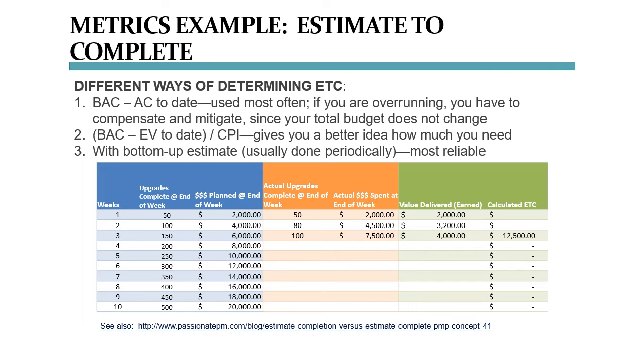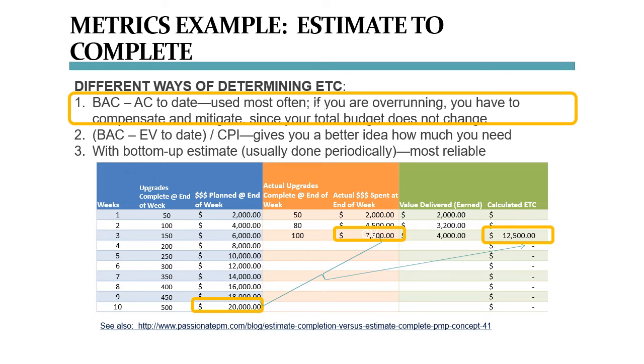If your project is running according to plan, and your earned value does not differ from the plan more than 5% or whatever percentage your organization tells you is okay, and I've worked in some pretty cash-strapped organizations that had a 2% rule, then you can just subtract your actual cost from the initial budget at completion. This works only, though, if you don't expect any costly problems down the road, and if you're confident that you can make up for any delays so that your project comes in as planned in the end. That's what we're doing in the plan you're seeing right here. It's a very rare situation though, and while the math is easy, it can cause lots of problems down the road.